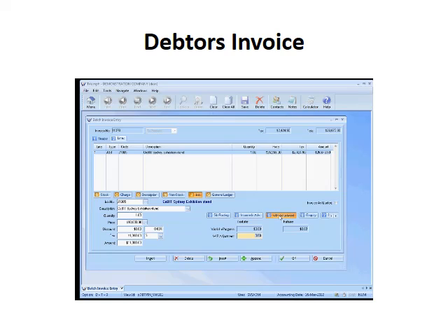For many people this causes a bit of confusion. I think the easiest way to explain it is like when you're selling a product. A product always has a known cost. So if I'm selling a part, everyone knows what it costs me. So at the moment when I'm invoicing this job for $10,000, the work in progress is realistically how much cost relates to that $10,000. There are lots and lots of different ways to do it. People do it on cost to complete, percentage complete, all sorts of things. It really is a matter of choosing whatever figure.